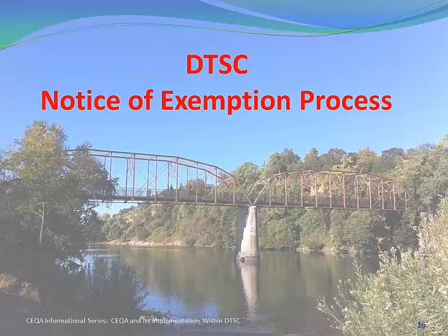The key factors that DTSC is going to need to evaluate for CEQA purposes are the new activities that the facility is seeking to do, as well as the changed circumstances in the neighborhood around the facility, and also changed circumstances in terms of what are the new regulations that exist now compared to 10 years ago when this facility was permitted. For example, the greenhouse gas evaluations were not required 10 years ago. They will now have to be conducted. So the bottom line is we're going to need to look at the changes that are going to result if we were to approve the facility's request for a new permit.